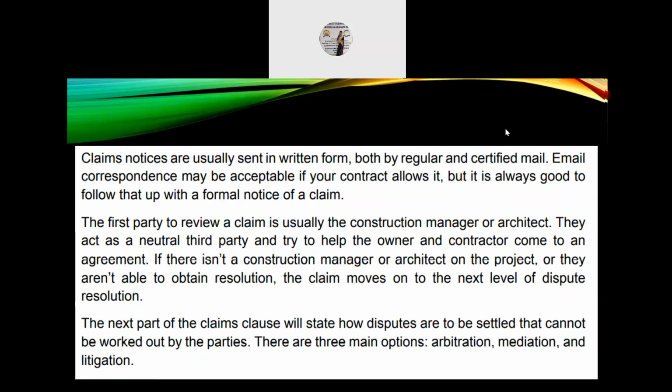Claims notices are usually sent in written form, both by regular and certified mail. Email correspondence may be acceptable if the contract allows it, but it is always good to follow that up with a formal notice of claim.